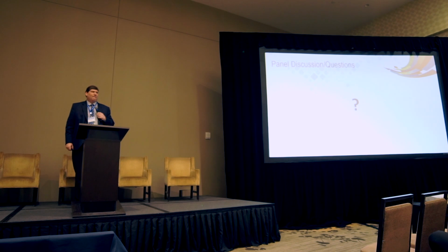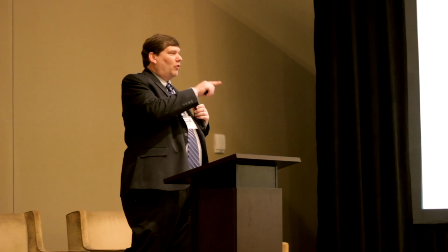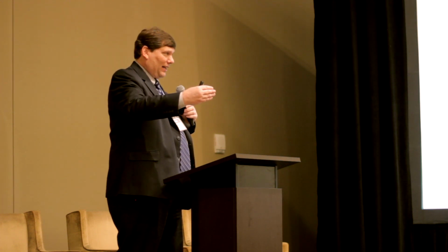As for maximum allowed fee, historically we see an average range of about 5 to 7% fee. I was reading that you had a de minimis of 10% you can do without doing the paperwork? That's new, but it only applies to grants. That's in 2 CFR 200 for the grant regulations. NASA historically awards through contracts, so that doesn't exist for contracts. Is that distinct from the fee? Yes, that involves your indirect rates, and fee is profit. Fee is just another name for profit.